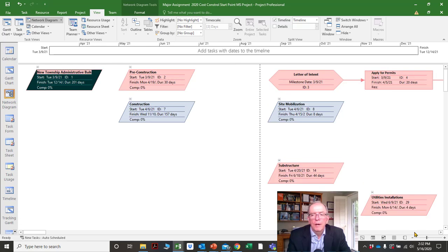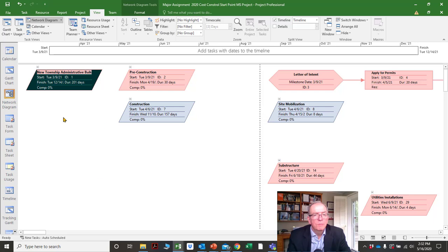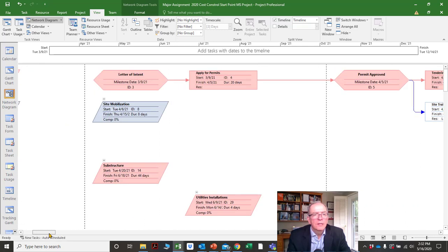These parallelogram shapes are part of the work breakdown structure headings. This shape with a point on both sides is a milestone — remember, a milestone has zero duration. If you're not sure, go back to tutorials 1 and 2.